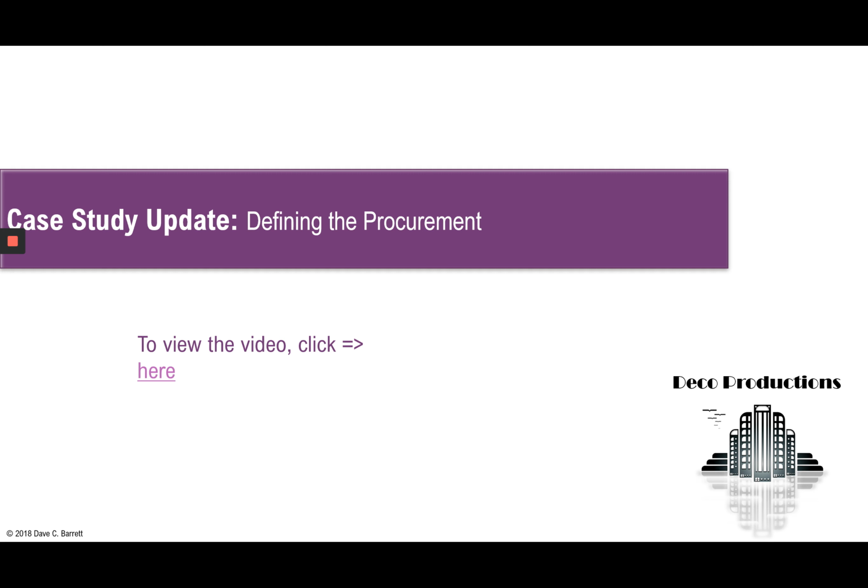The statement of work defines various things about the project. It's things like the specifications of the work to be completed, the required quantity, the quality or level of performance, the period of performance, everything about the work to be completed, the details of the specifications, and so on. All of that goes into the statement of work.